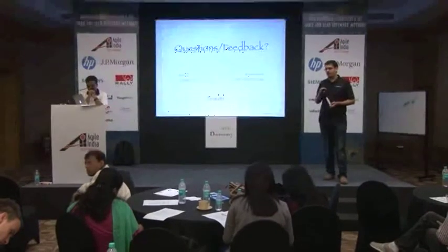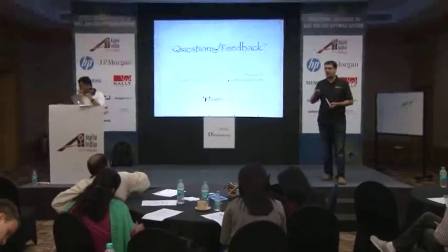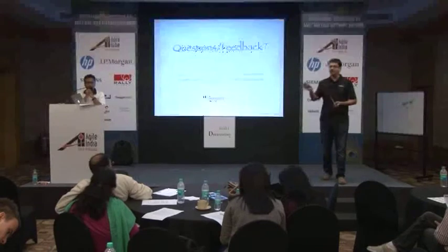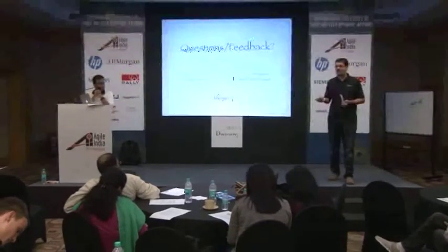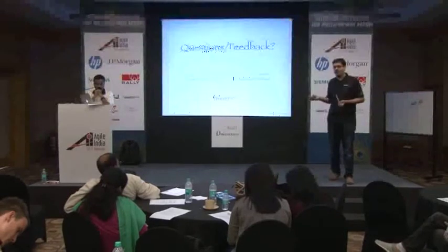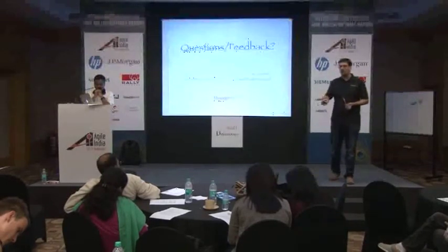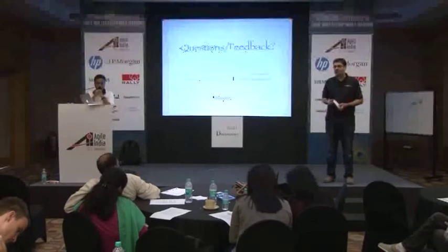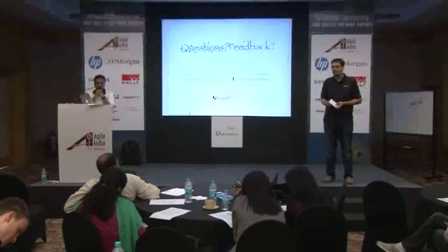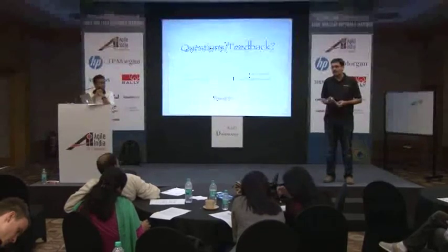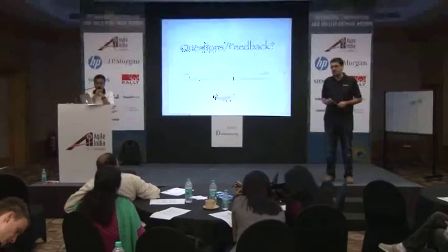Yeah, so we're not even looking at it as a monolithic thing, where we do a sprint demo and the entire team presents everything all at once. We'll look to just present things as they are ready. So it doesn't matter where they got ready from. But of course, if you're presenting to the client stakeholders who need to provide feedback, then yes, it will sometimes mean a 24-hour gap until we can get the right people. Until the right stakeholders are there, the purpose of the demo isn't served, right?